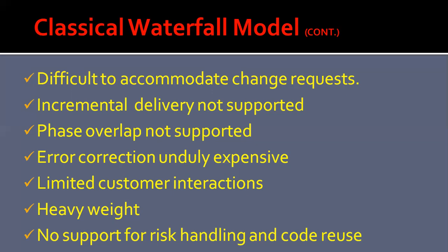This is problematic because the complete application may take several months or years to be completed and delivered to the customers. By the time the software is delivered, installed, and ready for use, the customer's business process might have changed substantially. So this makes the developed application a poor fit to the customer's requirements.